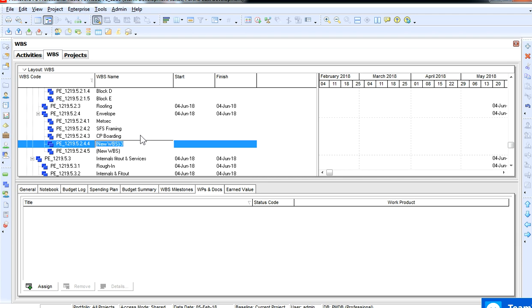So when the program's calculating how much the overall budgeted labor units are, when it gives you a summary of what activities have been performed and how many labor units have been achieved, as planned and through execution as built, it will calculate all of that. But the more activities you have in there, the more ambiguous the information you're processing is. So you leave it down to the activities that will actually be performed.